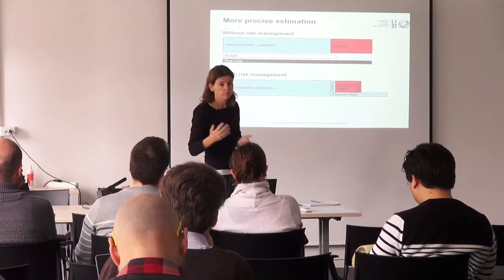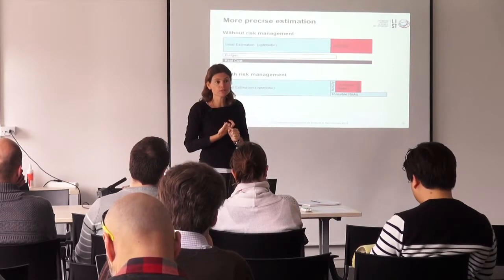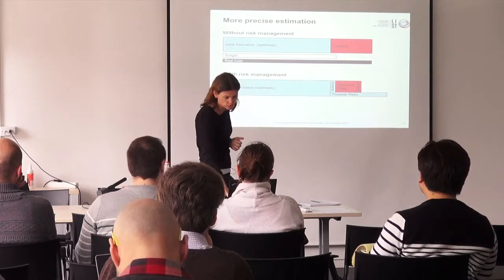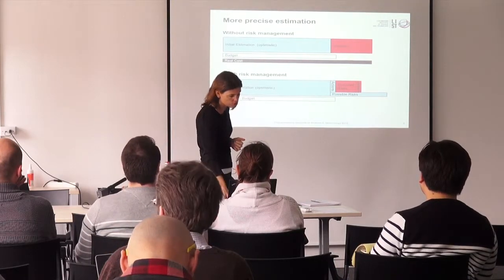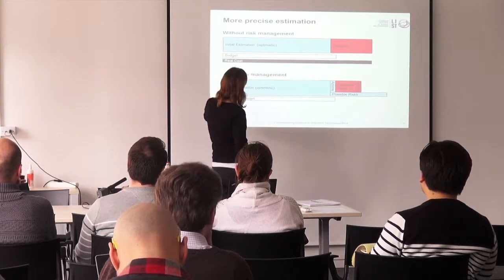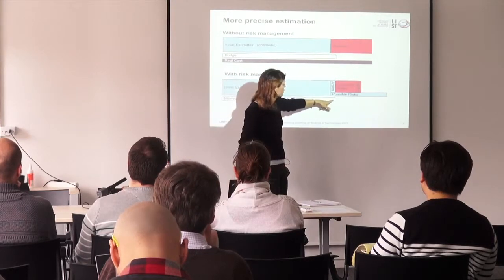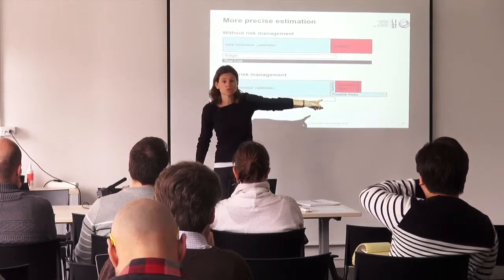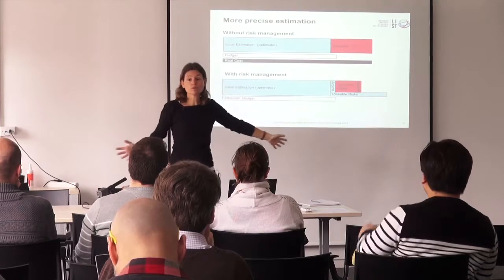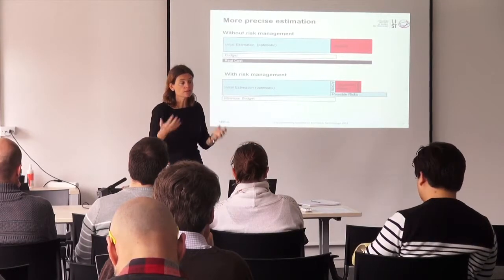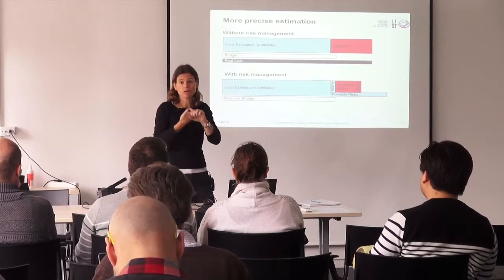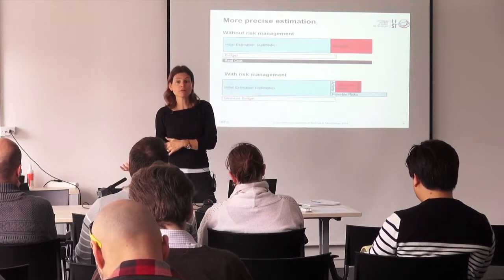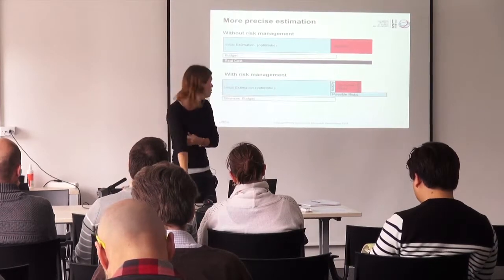There are some that you had not envisioned as risks that will come along the way. So you have some extra incidents that you did not envision. So your minimum budget would be the same as in the other situation, plus you have to pay for these actions. It costs something. Whenever you do something, it costs something. It's time that people from the team are spending on doing some actions mitigating the risk. They are not spending it on the project, so it costs something.